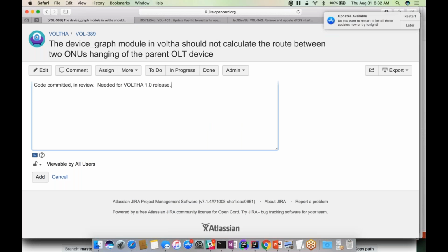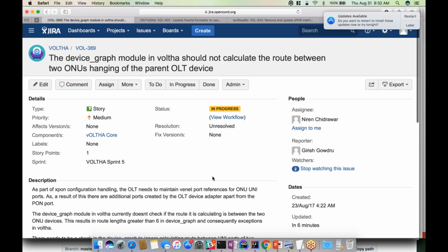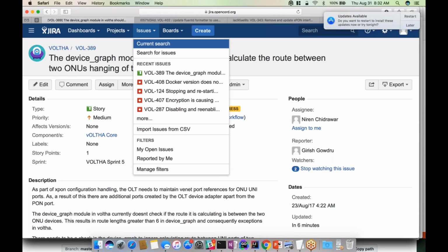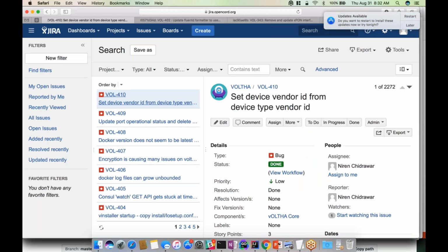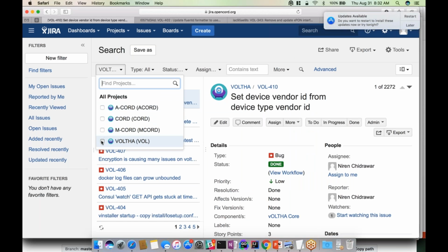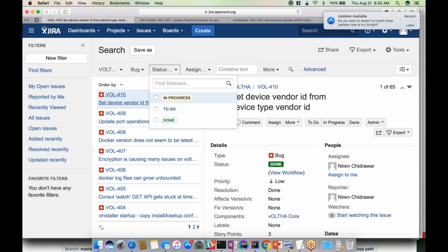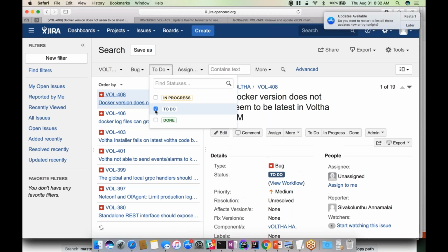They're bug fixes. It depends. Well, if we're really cutting a release and saying what we cut today, the support branch and tag, is the release, then any bug fix that comes after today goes into VOLTHA 1.0.1, not VOLTHA 1.0.0. Yes, because these issues were not flagged as Sprint 5. So I guess what I'm trying to understand is, are they needed for the release?